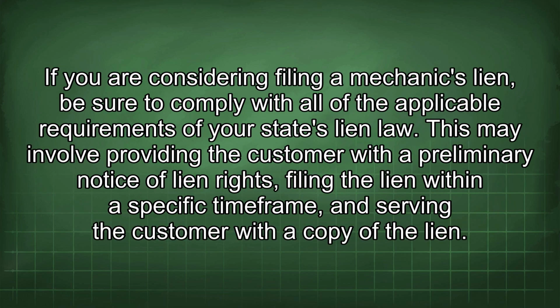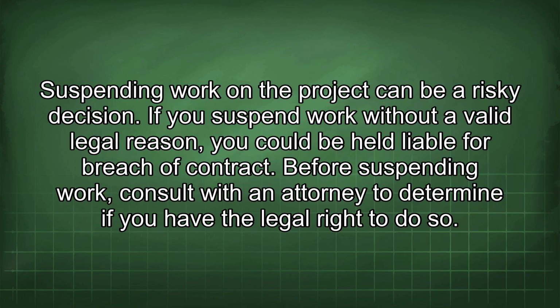If you are considering filing a mechanic's lien, be sure to comply with all of the applicable requirements of your state's lien law. This may involve providing the customer with a preliminary notice of lien rights, filing the lien within a specific time frame, and serving the customer with a copy of the lien. Suspending work on the project can be a risky decision. If you suspend work without a valid legal reason, you could be held liable for breach of contract. Before suspending work, consult with an attorney to determine if you have the legal right to do so.